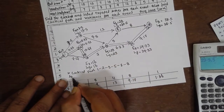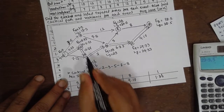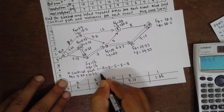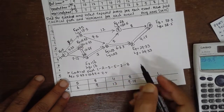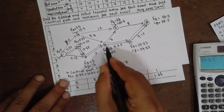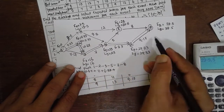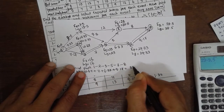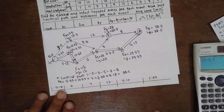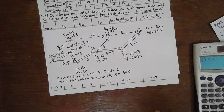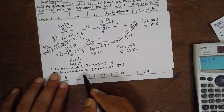We find the TE (expected duration) along the critical path. 1-2 = 5.33, 2-3 = 10.67, 3-5 = 7, 5-7 = 6.33, 7-8 = 9.17. Adding these gives 38.5. Write the units as days, events, or weeks accordingly.